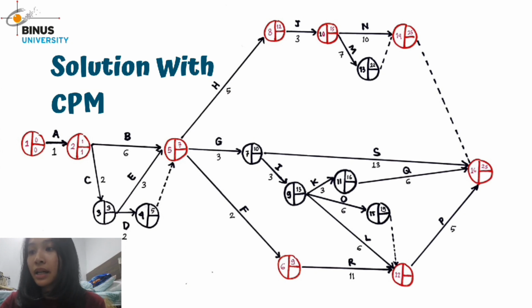The dotted line after D is called a dummy. Why do we add a dummy? Because D can't just stop there, and our final goal is electricity. Number 5 continues after B, D, E are carried out.